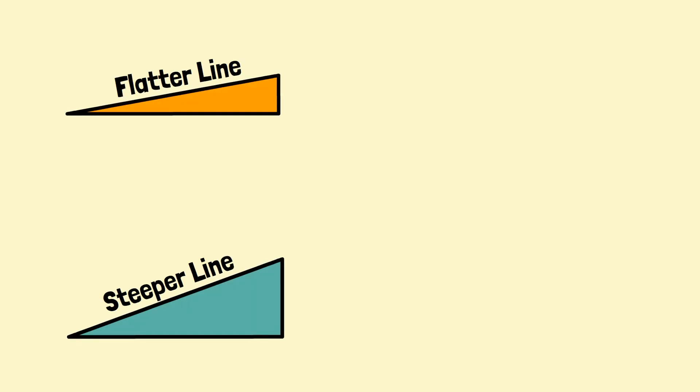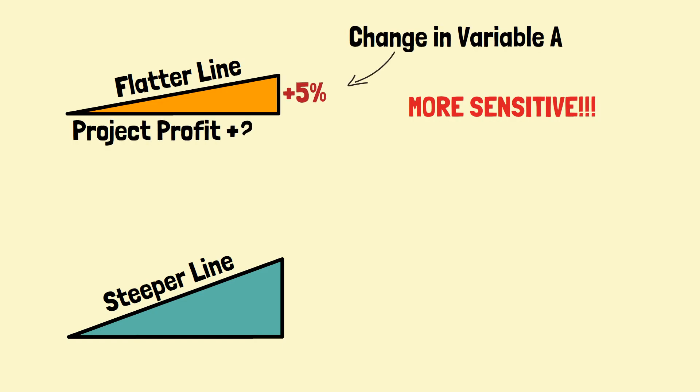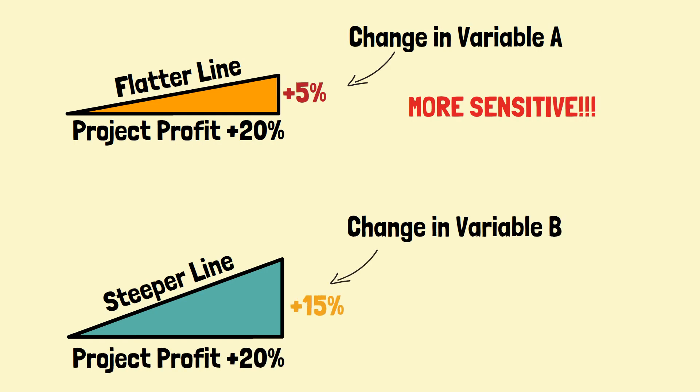Some lines are steeper, and others are flatter. In this SPIDER diagram, a flatter line represents higher sensitivity, as a slight variation in the parameter will have more impact on the profit. The lines will then help John decide which factor will need more attention.